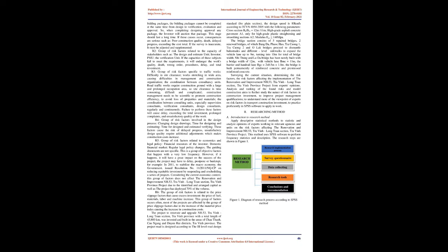In fact, the process of investing in the construction of works, especially transport works construction, always has potential risk factors causing unpredictable consequences. In serious situations, it will be deadly. For example, in the Kendo Bridge construction project, due to lack of geographic research, the scaffoldings collapsed suddenly while concreting the bridge deck, killing many people. Poor quality of work occurred in the Highway of Da Nang–Quang Ngai section project, where the work had just been completed for one month but started damaging, leading to prosecution. If mild, it will cause slow progress and exceed the total cost.